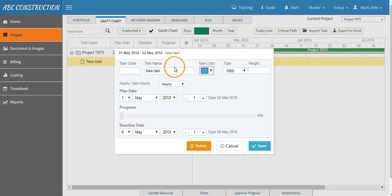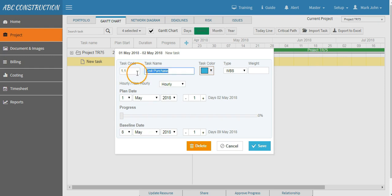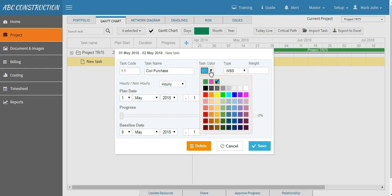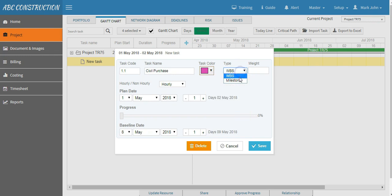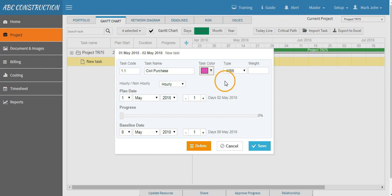Give your task name, say Civil Purchase, then task code. You can also give a specific color to your specific task. Select WBS or milestone. Weight will be automatically distributed by the software itself. Plan date - say this task will run for 30 days starting from first of May.